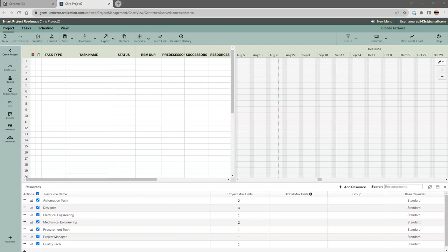Projects typically flow through 4 to 7 phases. An example of that might be in the engineering to order project environment. You might have basic engineering that flows into detail engineering. There's some procurement activities. You may have some assembly or manufacturing, and then testing and shipment.